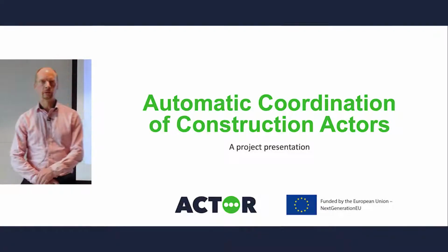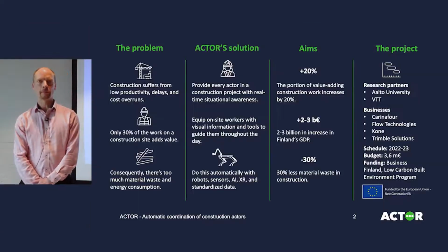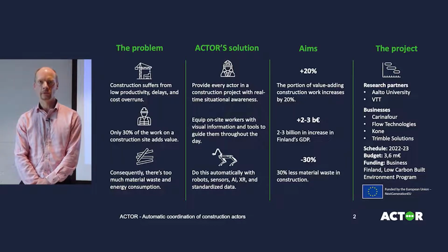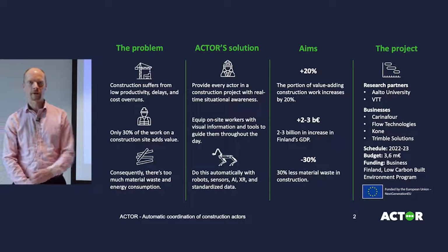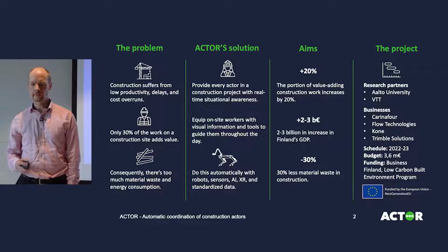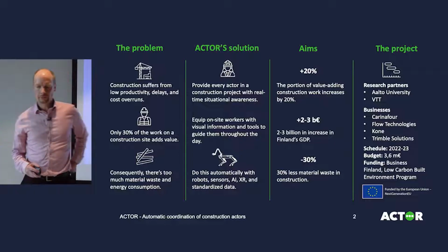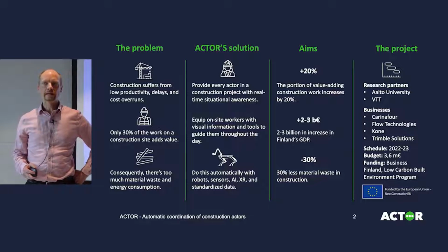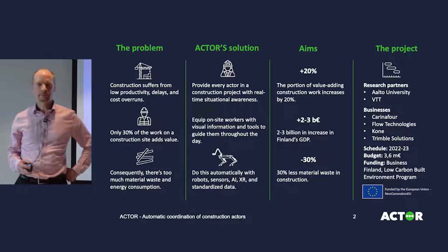The problem we are trying to solve with the actor project is low productivity, delays and cost overruns, which are also leading to high carbon consumption in construction projects. Only 30% of the work done on construction site is effective and adds value, and there's a lot of material waste and too much energy consumption during construction phase.